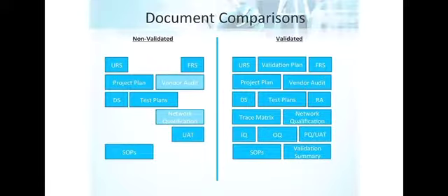Right. And you have to document clearly how we implemented the system, everything from networking and connectivity to configuration. You don't just do that once, you do that twice, three times, because you have to do it in a development instance. Then you have to use that document to do it in a validation instance, sometimes called the test instance. Then you need to do it again in the production instance. Yeah. Any deviations from that documentation, you have to work with the quality department. You could have to write a deviation report. You have to document in some manner.